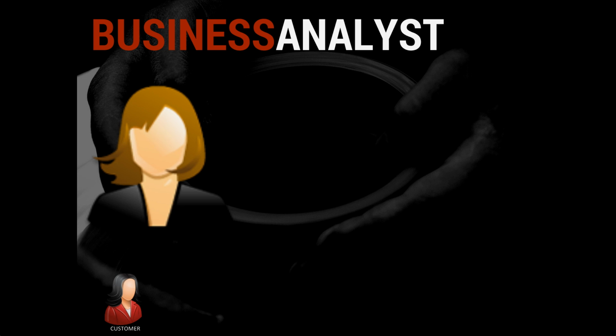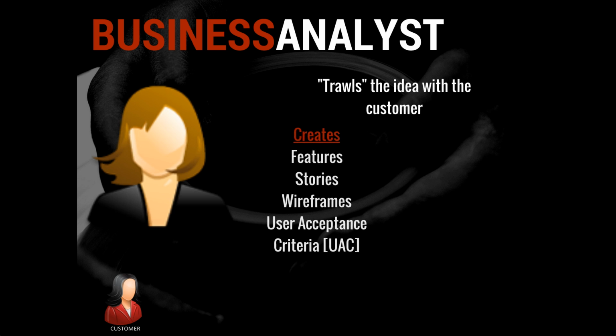The requirements are quite vague and subjective at the beginning. The main job of the business analyst is to make these as objective as possible so that they can be consumed by programmers and converted into working software. The BAs balance their time between creating just enough documentation and communicating with the customer and programmers. Other than the features and the stories, the BA also documents the requirements as wireframes and user acceptance criteria. The UAC, as they are succinctly called, are fine-grained business rules attached to every story.